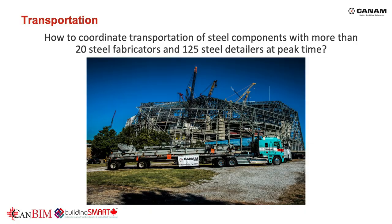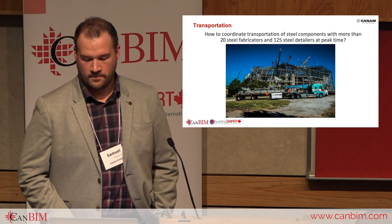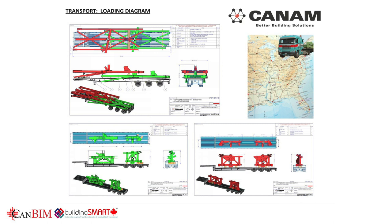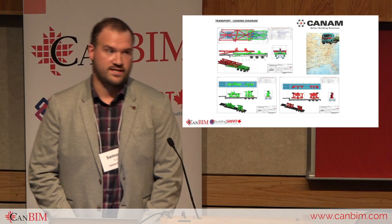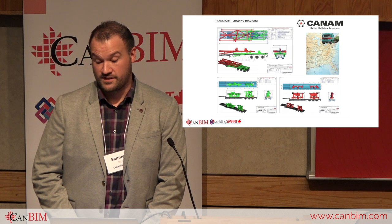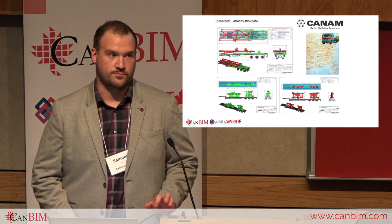The next BIM application is related to transportation. At peak time, with more than 20 steel fabricators and 125 steel detailers working on this project, how do we coordinate the transportation of all these steel components? First, we merge all the steel components into a centralized Tekla model with IFC files. Then we could create loading diagrams as you see on screen. Using a 3D trailer object, we could plan each load, position the center of mass of the object, and determine the supports. This facilitated coordination of shipping steel to the site and getting transport permits.